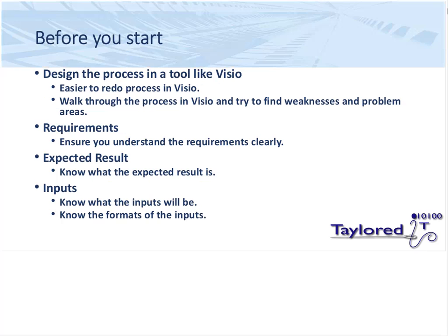On some of my bigger projects, I've spent as much as 3-4 weeks just working in Visio, generating the processes, stepping through them, changing them, stepping through them, changing them again, and going through 20 to 30 iterations before I even start implementing in PAM.